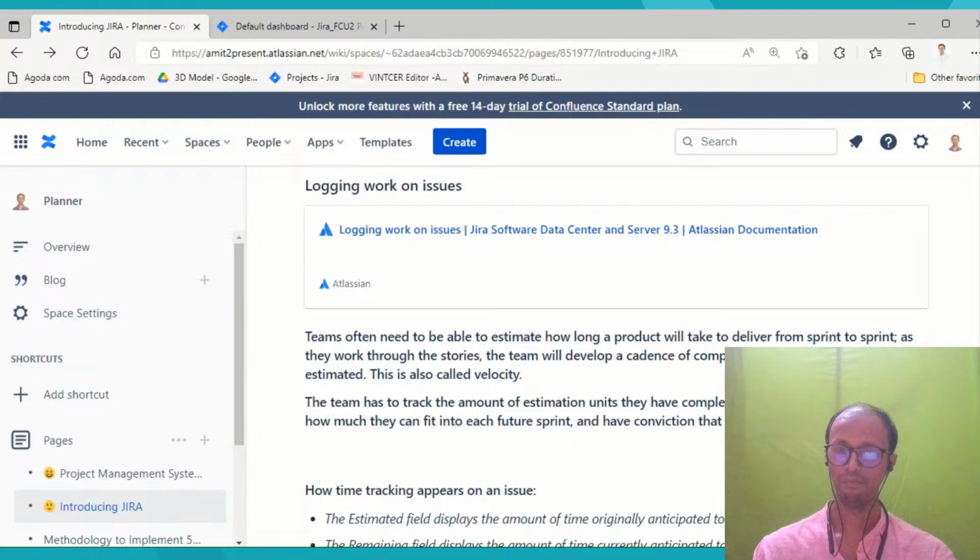Now, this is one more good thing. If we have some repeated sort of jobs, in which we know that after this particular sprint we have a future sprint which is going to have similar activities and a similar output, what we do is look at the velocity of that sprint, and see that this is the velocity we have achieved as of now. So in the future also this is going to happen, and in the future the completion date will be this.